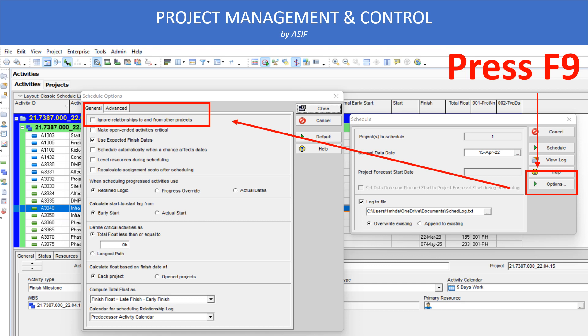However, it is not the recommended method to simply click this option. The best way is to check the program and remove all the external date constraints from it. But to be on the safe side, you can select this option so that your updated program will not have any impact from external dates. As an experienced user, we have to check the program for these external dates and try to remove them in the ways explained earlier.